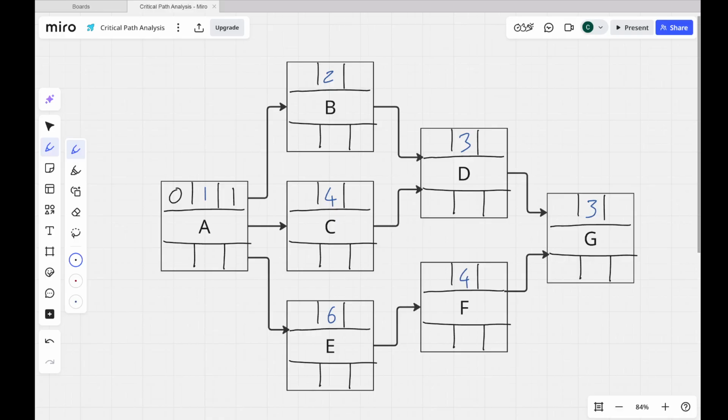It doesn't tell me we're finishing at 5 o'clock in the evening or midnight or whatever. It just says at some point on day 1, task A will finish. So task B cannot begin until A is finished, and A is finishing at some point on day 1, which means in theory, if we're not talking about any sleep or rests or anything else like that, I'm not worried about people finishing at 5 o'clock in the evening or whatever, we'll assume that everything can start the moment one task finishes.